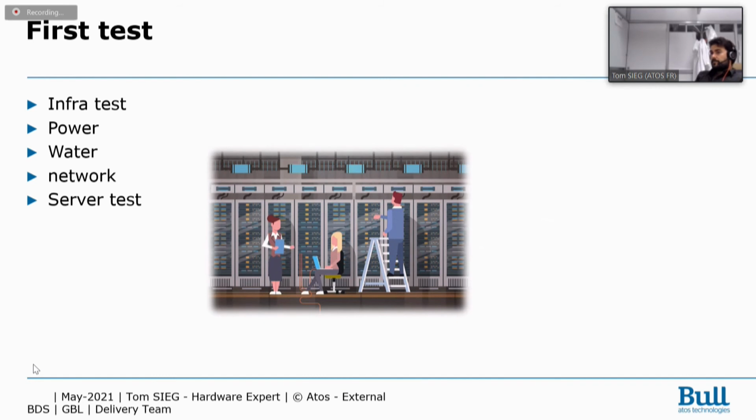At this moment, two possibilities. Your material came with a pre-software installation, so software made by your HPC provider, or the installation of the software begins at this moment. So you will be able to test with the software if everything is fine, if each component answers correctly, and it will be the beginning of a basic material test.